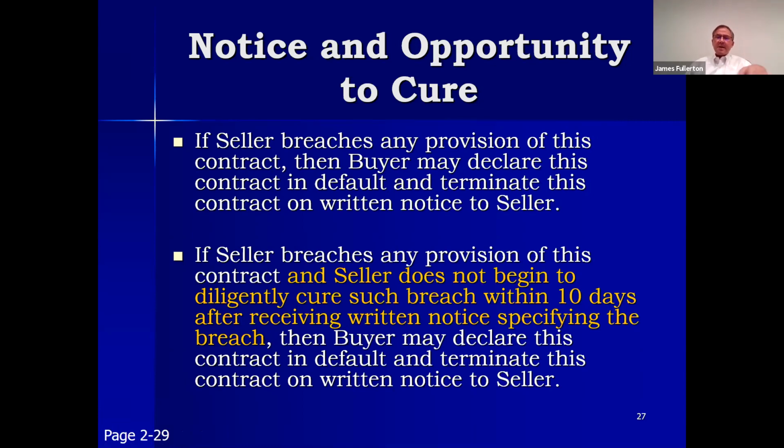If you end up in a dispute, 6 months later when you're in court, you're going to receive a list of 35 different things that you did wrong on the project and all the damages that were incurred as a result. You've protected your ability to say, wait a minute, Judge, this is the first we've heard of that. When this event occurred, all they notified us of was one problem. And so we're responsible for damage only on that one problem and not on all this other stuff that we're hearing for the first time. And a judge will enforce that.